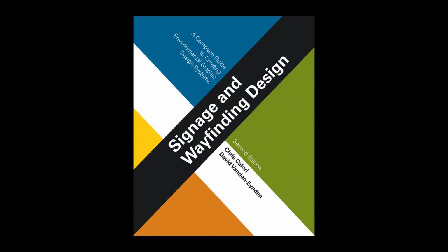Deciding on level of detail in drawings. The eternal question on design drawings is how much detail needs to be conveyed in order to obtain clear apples-to-apples pricing from fabricators. Thus, this is where the distinction between design intent and working drawings comes into play. It's generally understood among EGD practitioners that design intent drawings contain just the amount of detail that's required to convey the intent or outward appearance of the sign program's design. In contrast, working drawings contain a higher level of detail, typically regarding how the signs could be built.